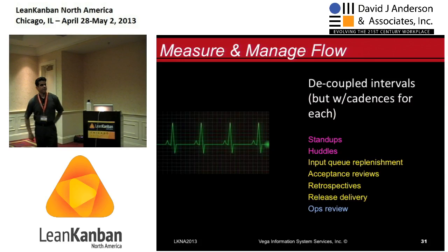And for example, the input queue replenishment activity, which is something similar to the sprint planning, if you will, we started doing that about every 35 days plus or minus 7. Well, where did that come from? That came from measuring and managing these larger work items called epics, and as they went through the workflow, we realized that we would get one done about every 28 to 42 days. So we still did, quote-unquote, sprint planning, we just didn't do it every 2 weeks.